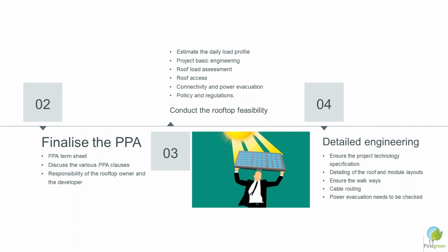Once you have identified, then of course you have to do a feasibility assessment, and you have to collect the details of the plan, maybe daily, hourly, and maybe weekly load profile should be collected for the facility. And once you have the consumer load profile, then you have to match the facility load profile with the solar load profile, and you have to ensure that whatever you generate should be consumed in the client facility.